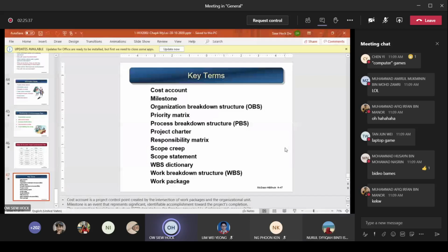Okay, doctor. So that's the way I allocate the responsibility matrix. You know how to apply it. If after the supporting person checks, you still feel not very confident whether you overlooked something or missed something, and you want me to have a quick look, you just send to me. Sometimes when they send to me and I see some mistake, I just point it out. It's good to get one person in charge of designing and building the thing, and then 2 persons go and check. Then 2 persons will be able to find the mistakes.